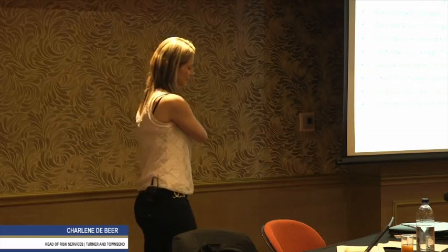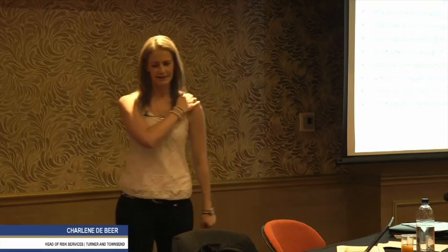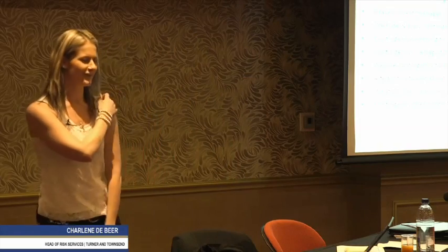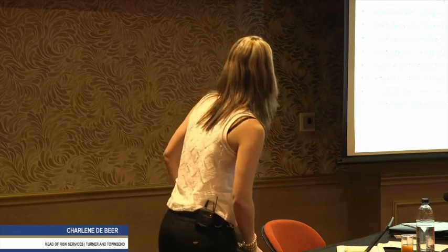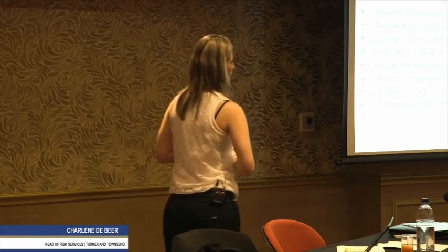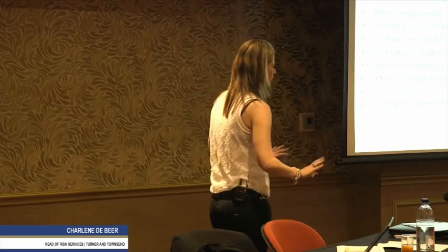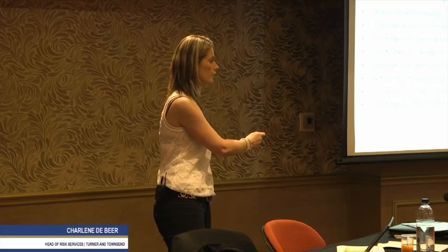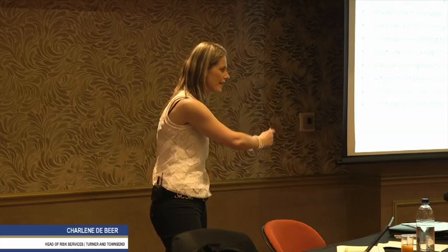And then that 10% thumb-suck contingency, which the estimators always come up with. I love discussions with estimators, it's like with engineers. I find them fascinating. So I usually challenge the 10%. And then what do we say? What do you mean we cannot advance contingency? The project manager says it's okay, we can draw down, there's contingency money, we're just going to draw down on it. Well, if we did a proper risk analysis, we would know what that contingency is for. And we can only apply it if that happens.